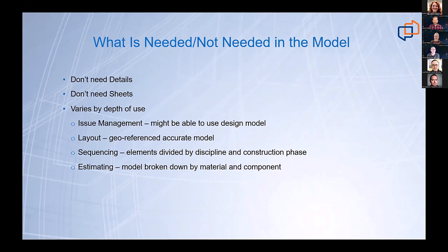Sequencing. You're going to want your elements divided up by discipline and by construction phase. And for estimating, you want your model broken down by materials and components.